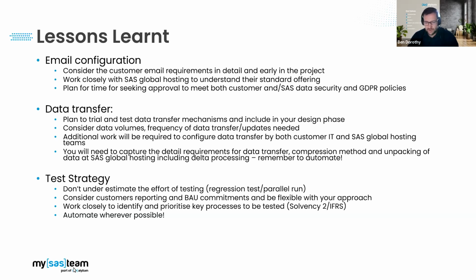So that's another area that we need to, again, address as quickly as possible, and set up some time in the early phases of the project to do some proof of concepts, because every client environment is going to be different, with different security considerations to take into account.